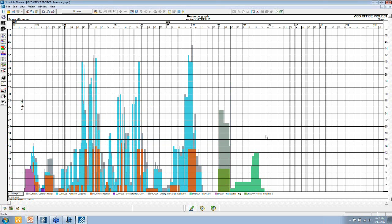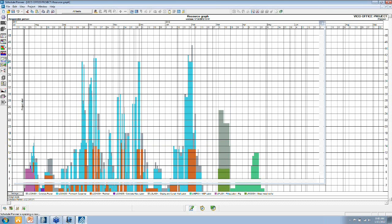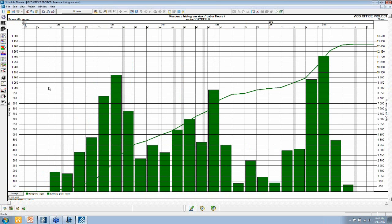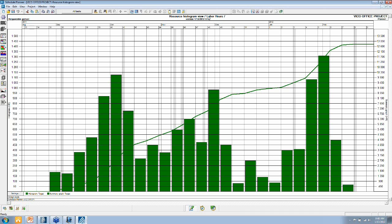And the resource information that we're getting from the cost database generates resource histograms. This is an example. It shows the labor hours, total amount of labor hours over time. So for each of the weeks in the project, it shows me how many labor hours I have on site.